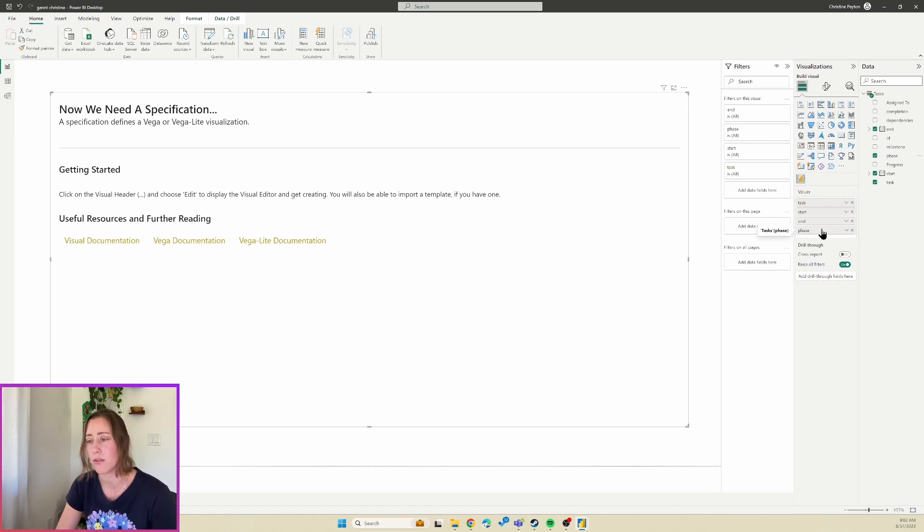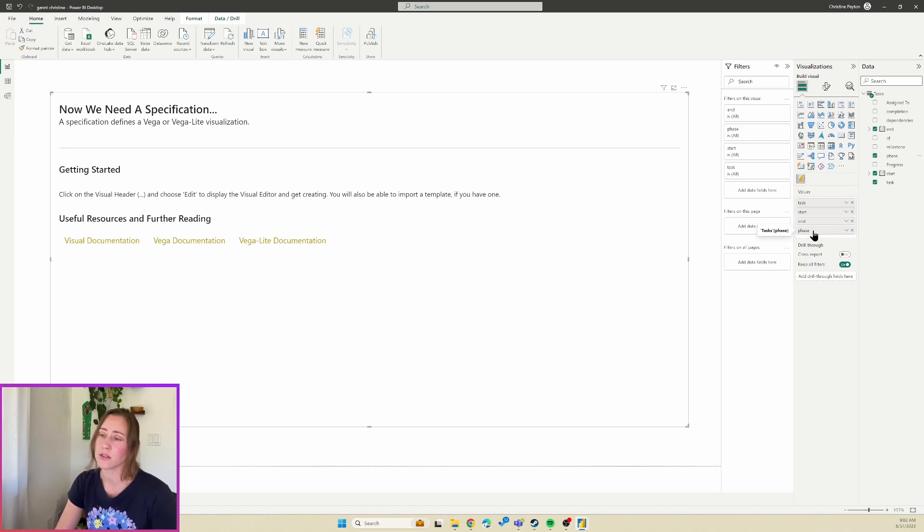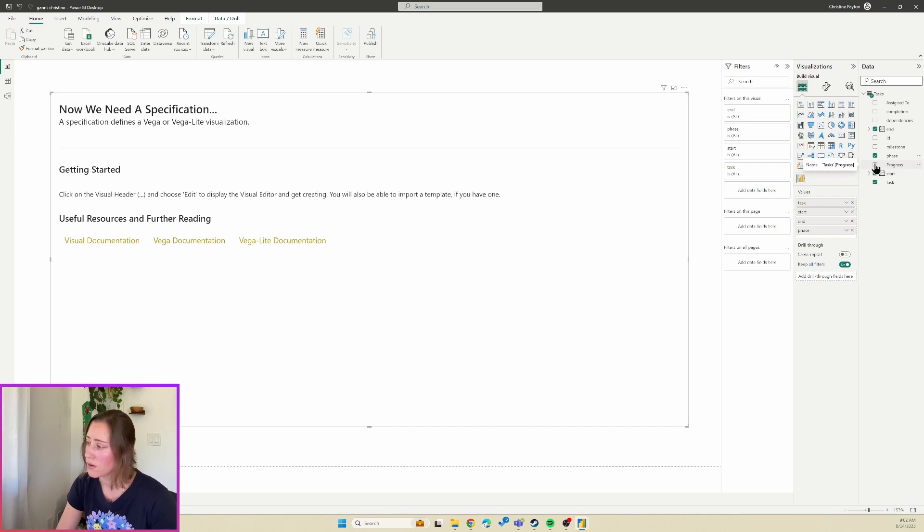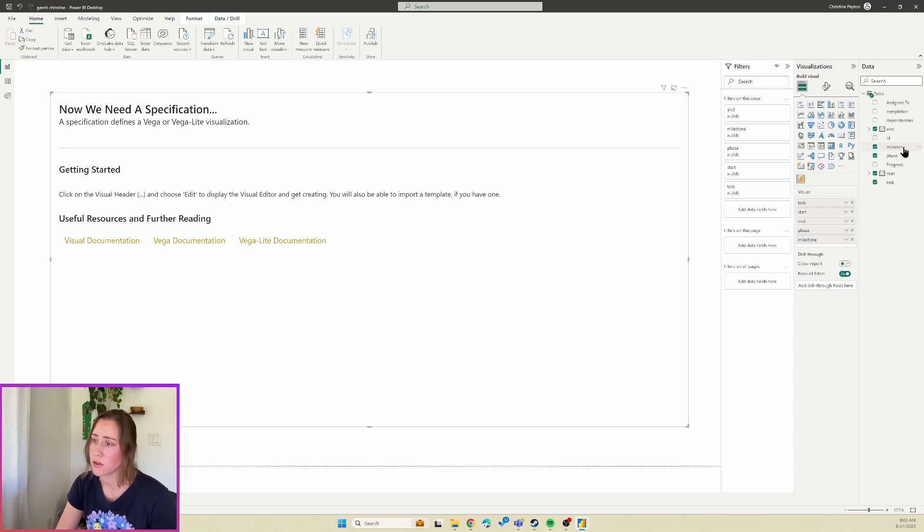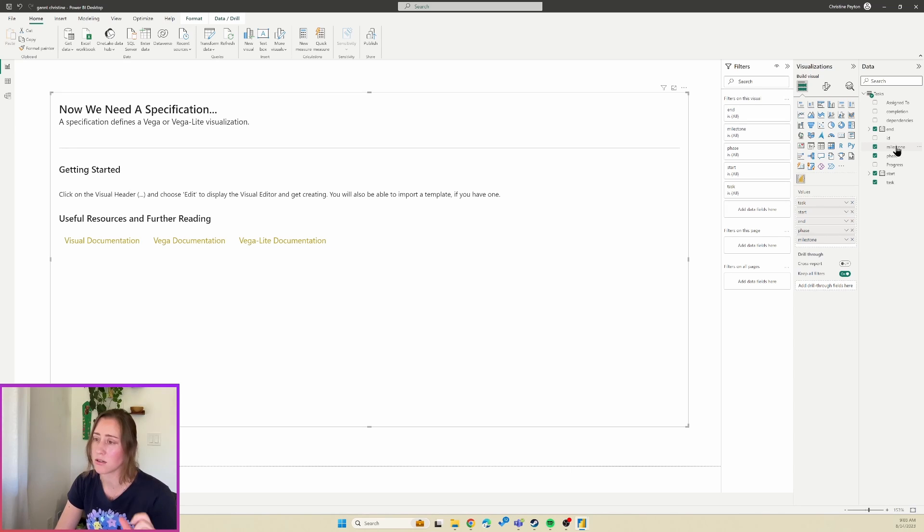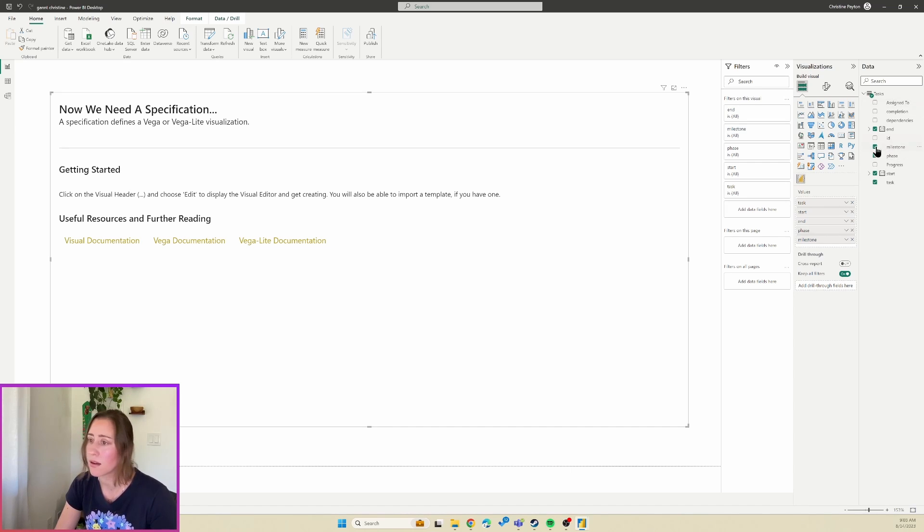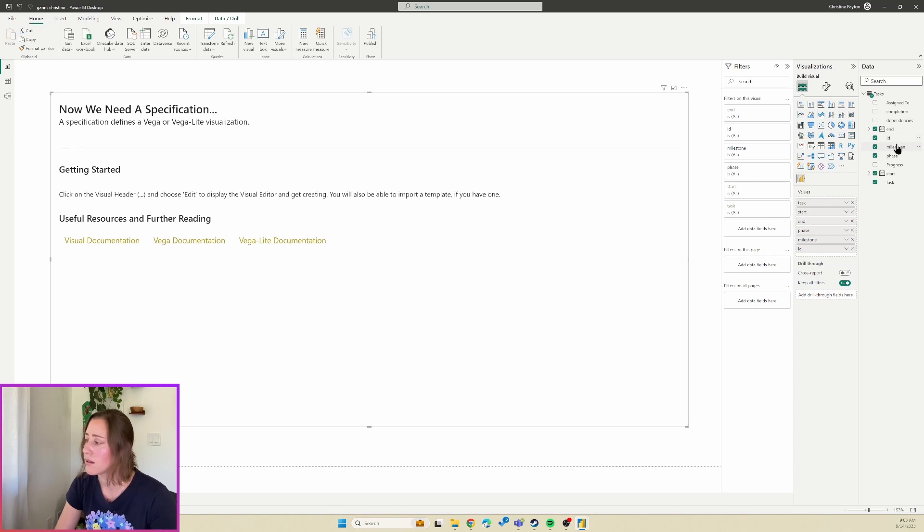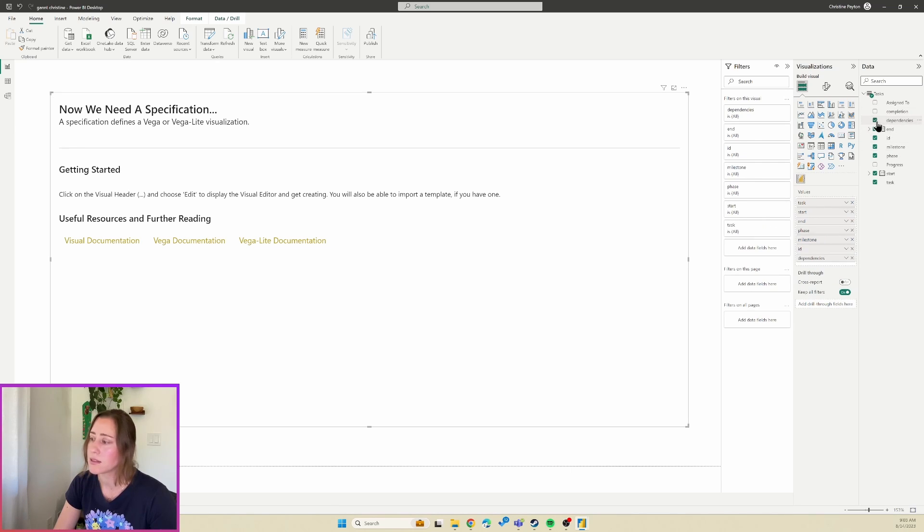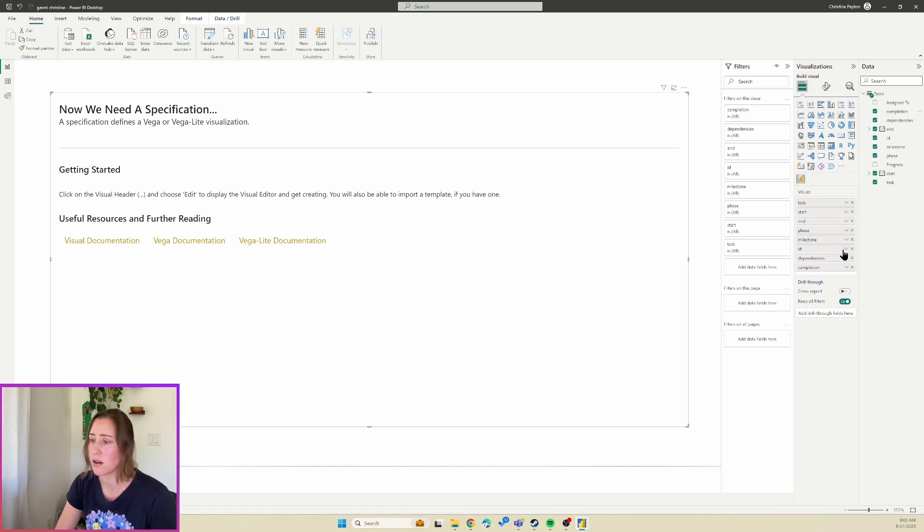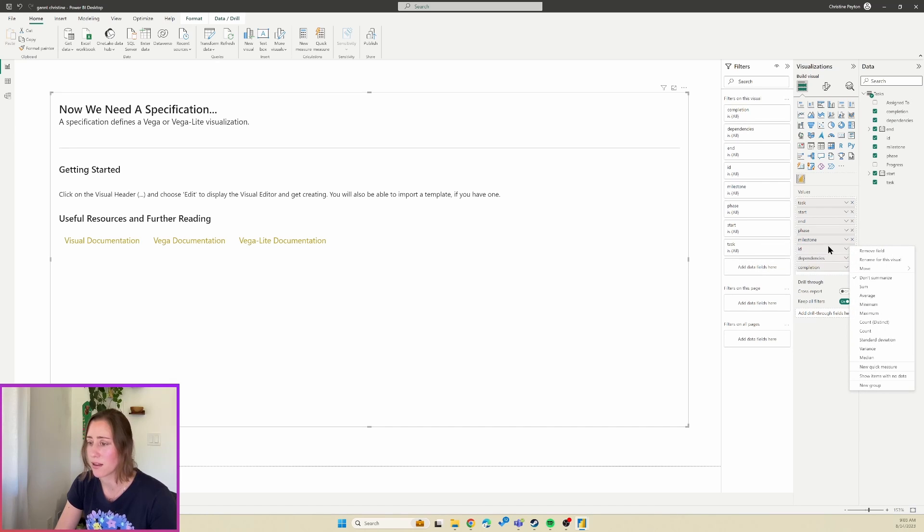Looks like I forgot to turn off the date hierarchy, let's stop that. Start and Phase, and the phase values can be whatever you want. So phase is just a text field, you don't have to use the same phase names as are in the example, you can use your own. And then Milestone, so milestone is a true/false field, so is this milestone yes or no. And the milestones are just single date points, so you want the start and end date to be the same. ID, Dependencies, and Completion. You'll notice that I've turned off the auto summarization, so if you drop your ID in here and it's automatically trying to count by or whatever, you can just change this to Do Not Summarize.